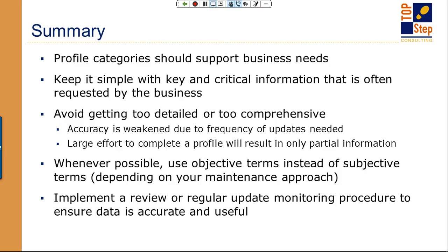And then implement a regular monitoring process. If you don't, people will be looking at old data. About the first or second time that they pull somebody up that it says that they don't have such and such skill, but they really do, they're going to lose confidence in the system and give it up.